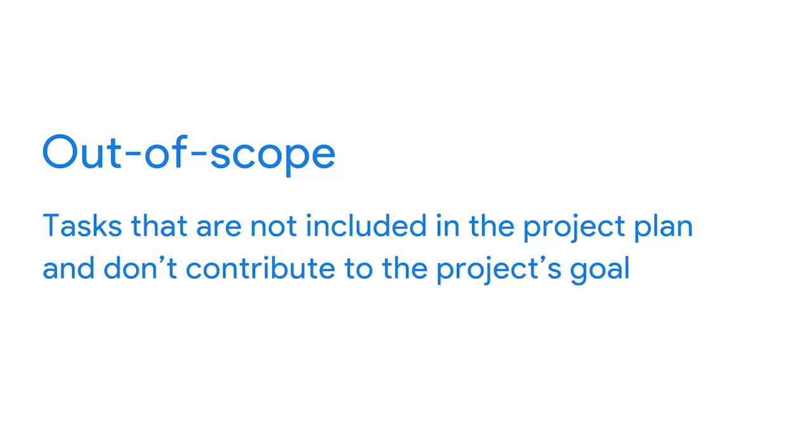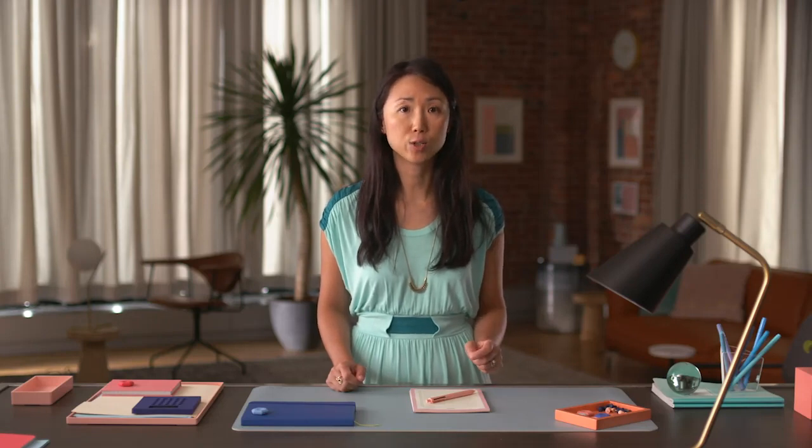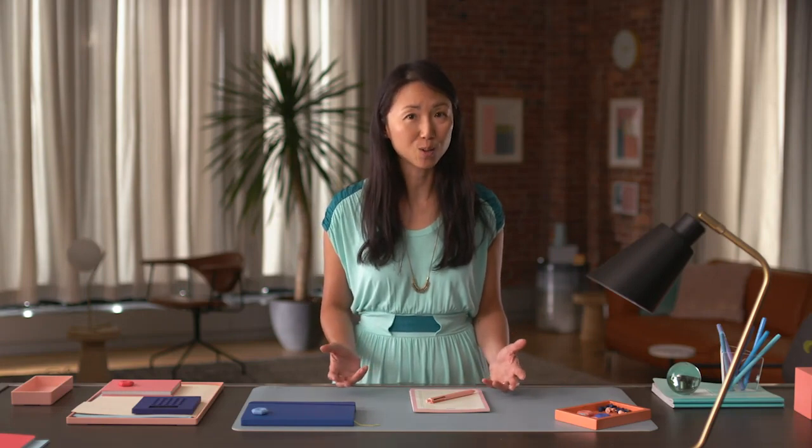It's your job as a project manager to set and maintain firm boundaries for your project so that your team can stay on track. For example, if the copywriters or designers of the Plant Pals catalog came up with the idea to expand the type of plants being offered to top customers, you would have to point out that their suggestion is out of scope and would take extra time and add to your budget costs.